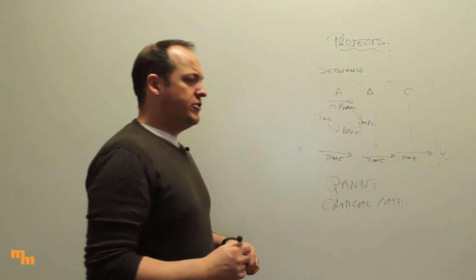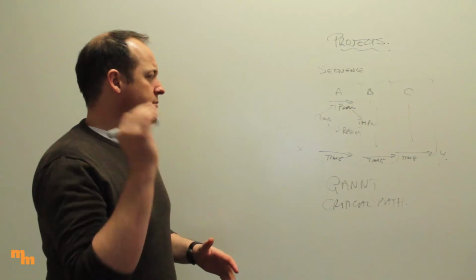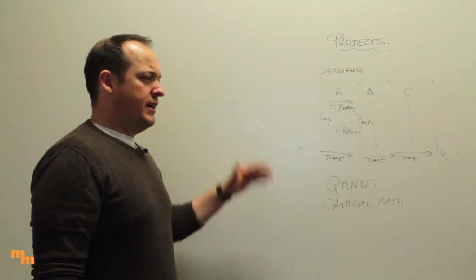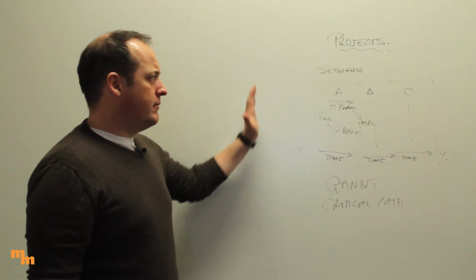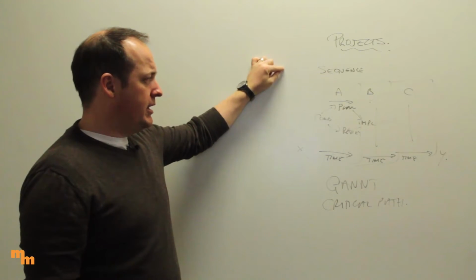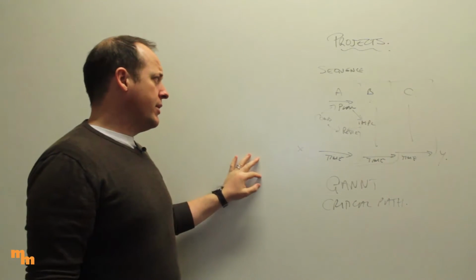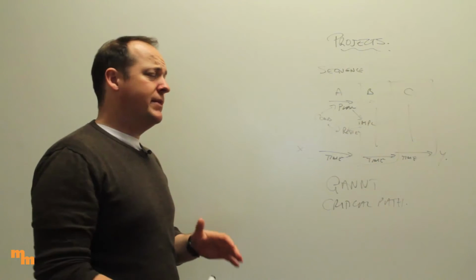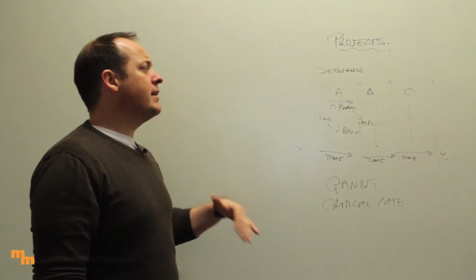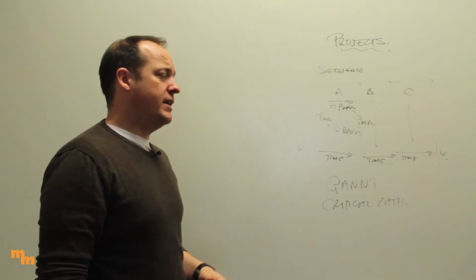And that's where you're literally thinking about the start and finish times and starting to work out what relates to what. Okay, so you're just going through the diagram. So if you go through the critical path, you start at the beginning, you get to the end, you work out how long everything takes. Once you've done that, you can work out, well, if everything works, we end up on time. But if there's any delays or problems with that, it's going to blow our timings out.